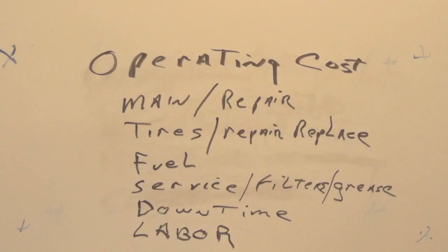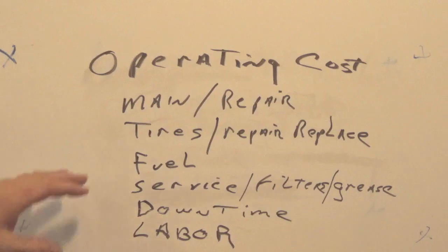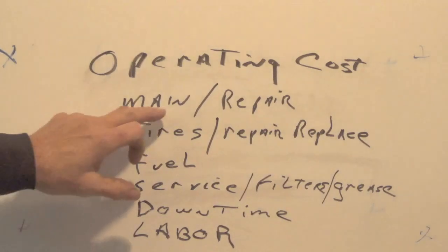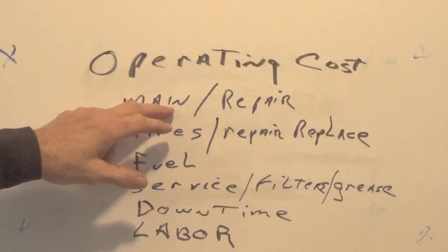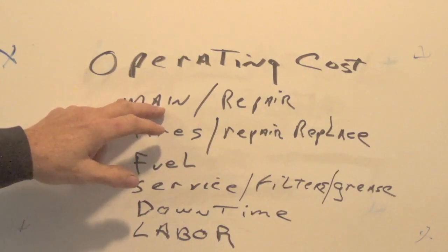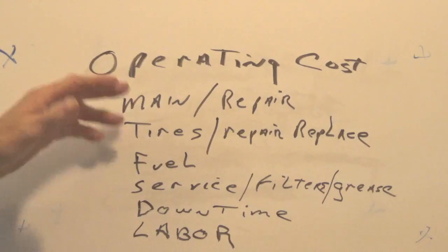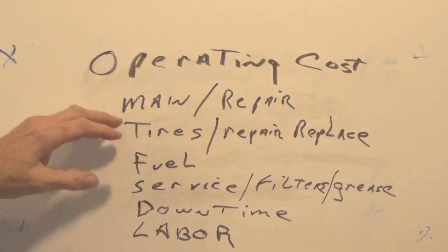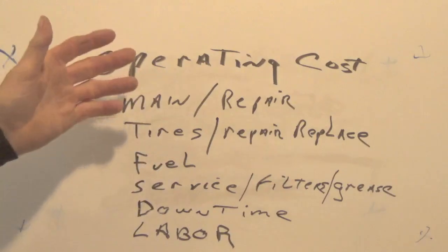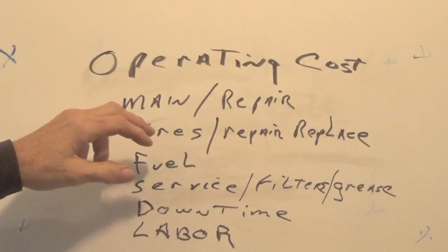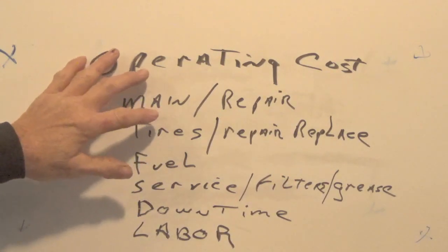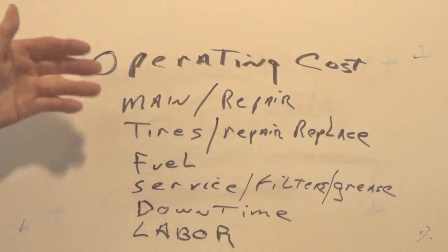Manufacturers tend to inflate the longevity of things and how well they operate or last. So with that said, historical data is the best. In other words, if you know that every year you have to replace a drill because it just doesn't last. Or say, battery operated stuff. Battery operated stuff is nice, you're not dragging cords around. However, you have to buy batteries, so that's a maintenance item, okay? So under maintenance, you would have to calculate for batteries.